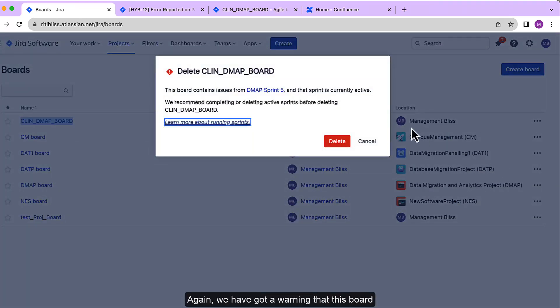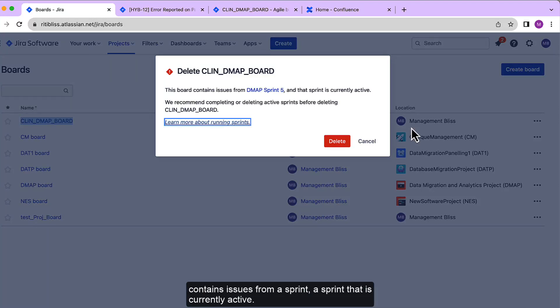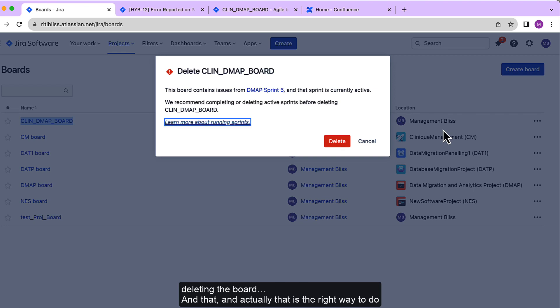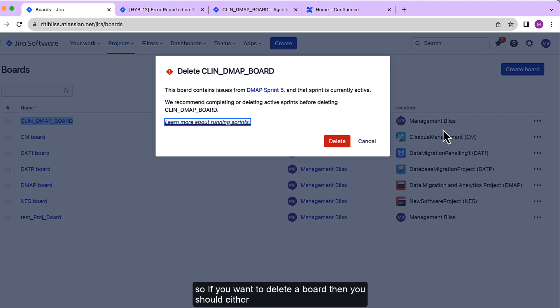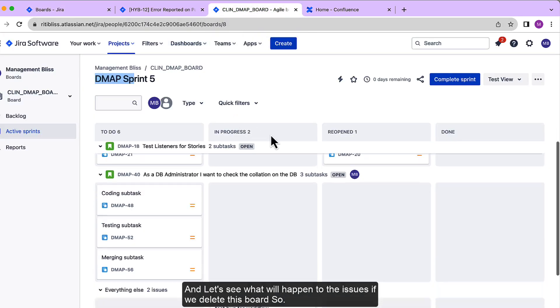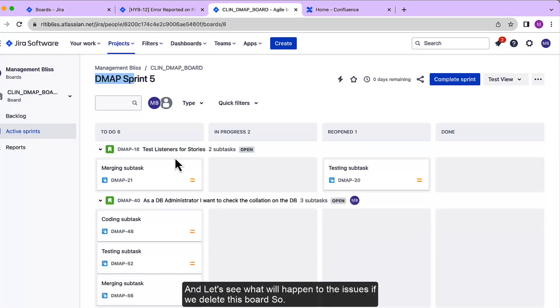Again we have got a warning that this board contains issues from a sprint that is currently active. So they recommend to complete or delete the sprint before deleting the board, and actually that is the right way to do it. If you want to delete a board, you should either complete the sprint or delete the sprint before. But now let's go back to the board once again and let's see what will happen.